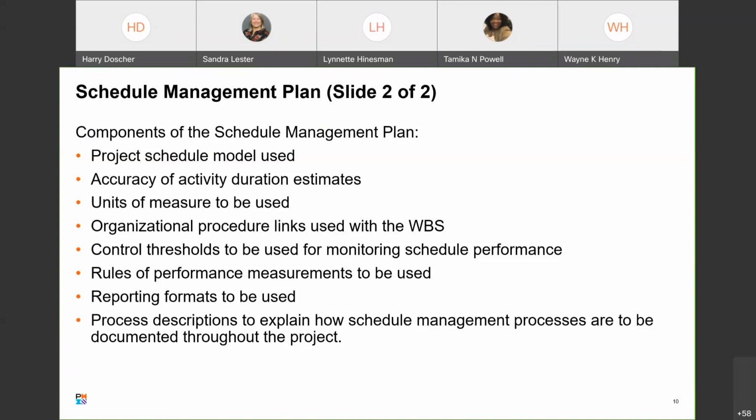so that if your performance is within the upper and lower bounds, you're on schedule. Above the upper bound, it looks like you're ahead of schedule. Below the lower bound, and that's where you start raising jeopardies in a predictive project.